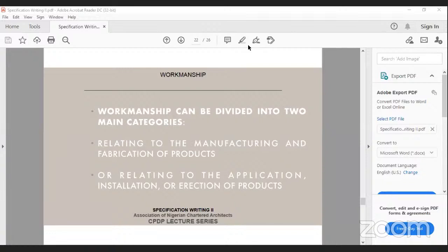You probably will need your mechanical engineer to make sure that all the sleeves that are going under the layer of tiling have been met. You probably will need the electrical man to make sure that any wiring, any conduiting that is going through that path has been done properly, just to install tiles in a particular area.